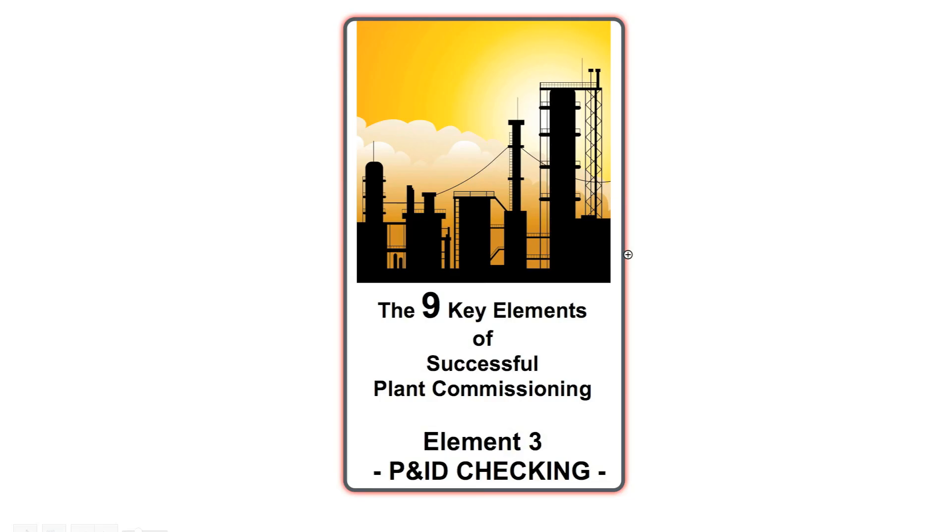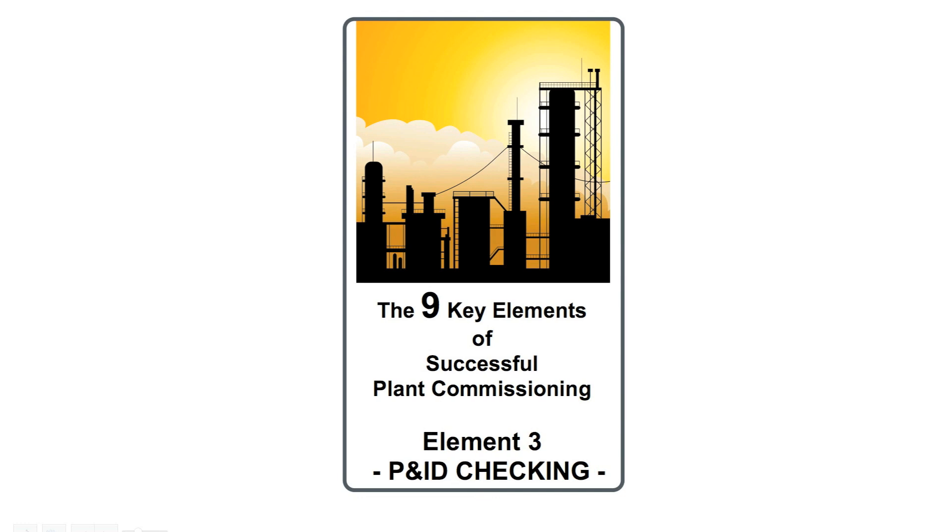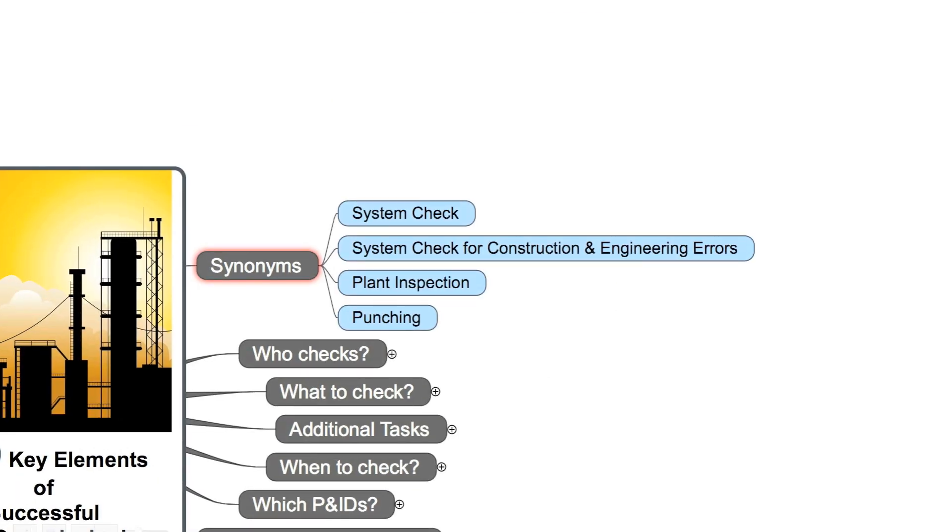The 9 key elements of successful plant commissioning, Element 3: P&ID checking. You can say as well system check, system check for construction and engineering errors, plant inspection, or punching. All these words are synonyms for P&ID checking.